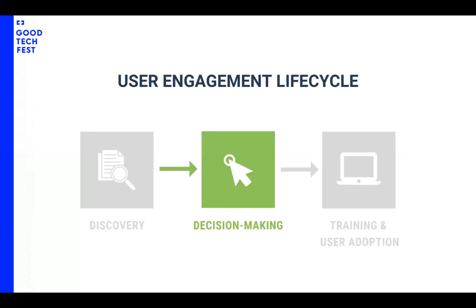And so to ensure that our phased approach had a logical progression, what we did initially during the discovery workshops was to identify our priorities and dependencies. And basically we started with the biggest pain points and those sections that would form a foundation for subsequent builds. And for us, that was the case management aspect of our work. And then basically what we've been doing pretty much over time is building on this initial build.